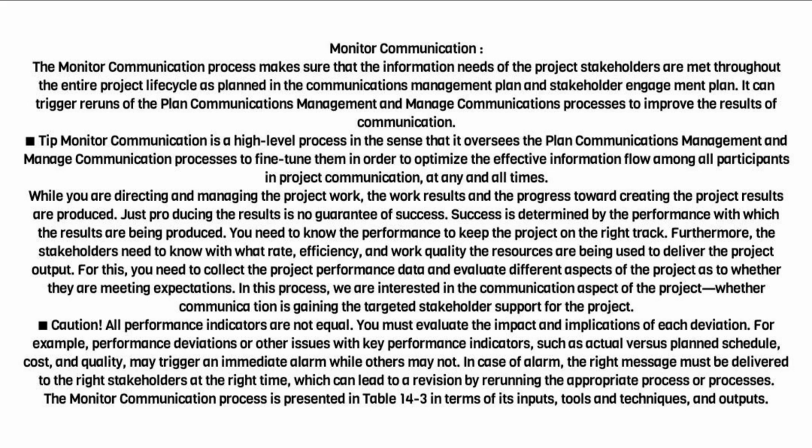Monitor communication. The monitor communication process makes sure that the information needs of the project stakeholders are met throughout the entire project lifecycle as planned in the communications management plan and stakeholder engagement plan. It can trigger reruns of the planned communications management and managed communications processes to improve the results of communication. Tip: Monitor communication is a high-level process in the sense that it oversees the planned communications management and managed communication